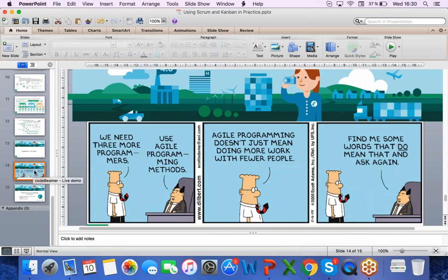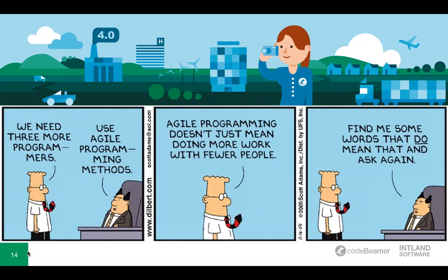So as you can see, the Scrum and Kanban methods are pretty distinct and they won't always work for everyone. But very generally speaking, if your teams have working processes that work just fine but could use some optimization, then Kanban would be the appropriate choice, as it lets them gradually improve all their tried and tested processes. On the other hand, if the development team seems to be stuck in a ditch and a fundamental change of processes seems inevitable, you should probably turn to Scrum to enhance efficiency.